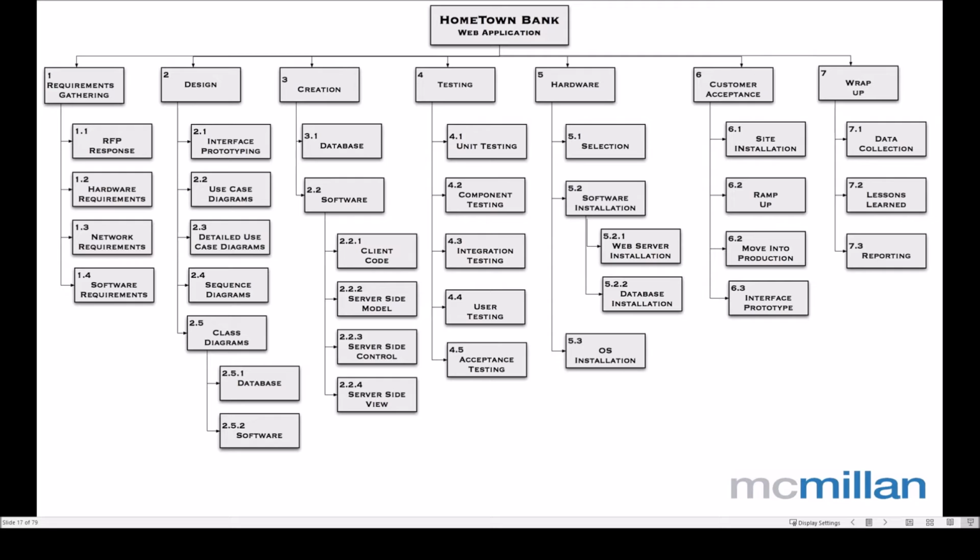And that's the first component of the work breakdown structure, where we start at the top. This is the project, and you can be as descriptive or as succinct as you want. These are the deliverables, the next level down of the hierarchy. And then we take each of those deliverables and break that down to the degree that's within our scope of responsibility. Why do I say that?